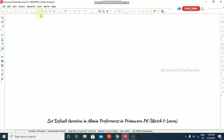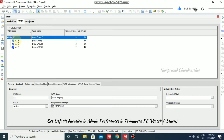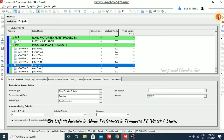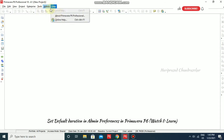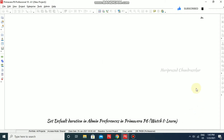So in WBS we have entries like 1.1 and 1.1.1 — this dot is the code separator. If you want to change it to something else, you can do that. I'm going to Admin Preferences and setting the code separator to plus. After closing, this will be applicable to new projects we create.